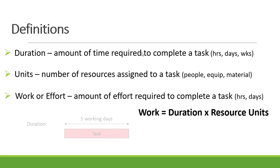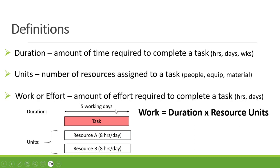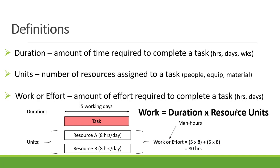Duration is the amount of time required to complete a task — it can be hours, days, or weeks. In our example, the duration is five working days. Units refers to the number of resources assigned to a task — people, equipment, or material. For this example we work with people: two people assigned, each working eight hours per day. Work is the amount of effort required, calculated as duration times resource units. So work equals resource one (5 days × 8 hours = 40 hours) plus resource two (5 days × 8 hours = 40 hours), totaling 80 hours.